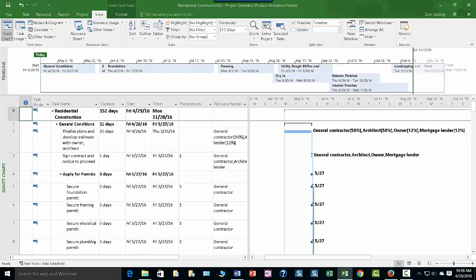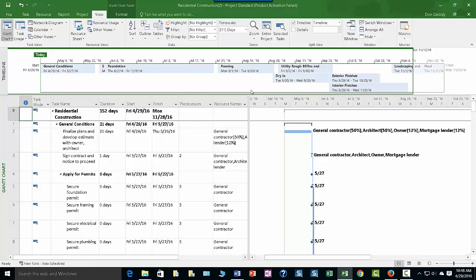But some tasks are important, but they're not critical from a time sensitivity standpoint. There's what the text calls slack. You don't have to do them exactly in that time, and you've got a little bit of slack. You can do it either before or after a little bit. Sure, it has to get done, but the timing of it is not as critical. And typically, the critical path, as the text mentions, is the longest path. So most things are critical, but some aren't.